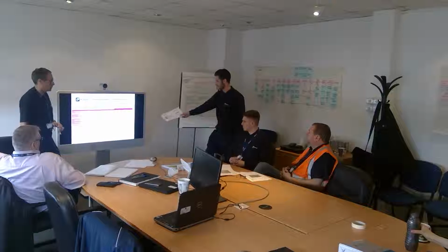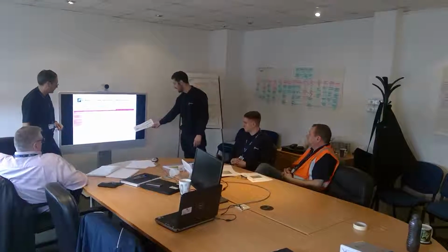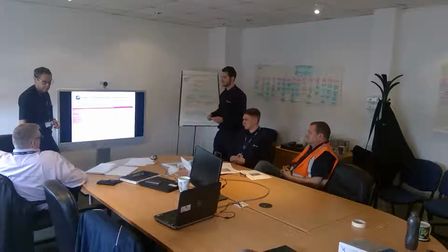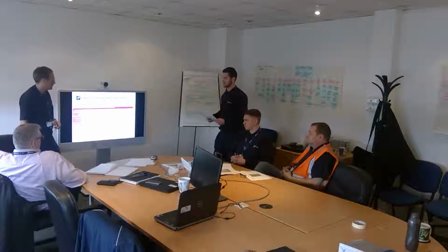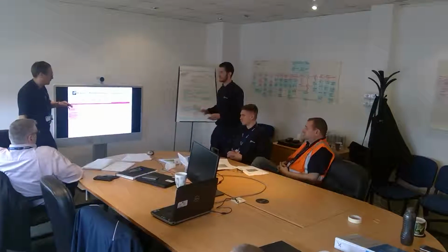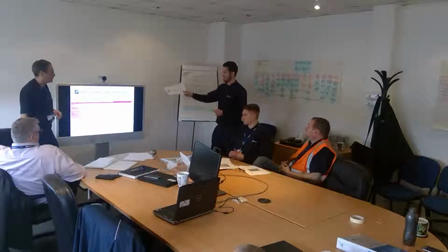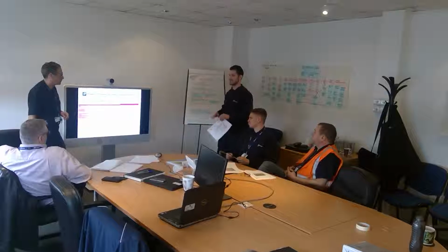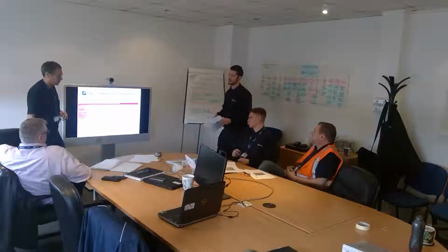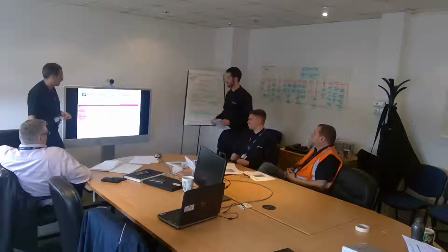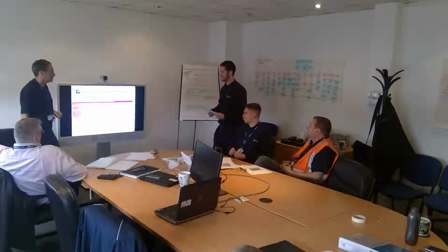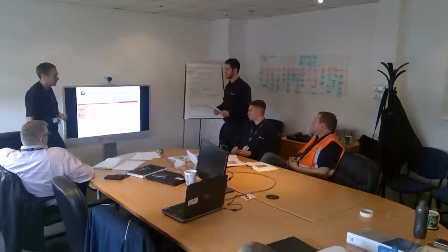But if we take an assumption that it happens twice a month, we're looking at 12 grand a year. And that's based on it being of that magnitude, that same similar scenario. It could be worse, it could be less, but it's just a bit of an average. I think twice a month is quite conservative as well, really, isn't it? Can be, yeah. Busy as we get sometimes, mistakes happen, don't they?